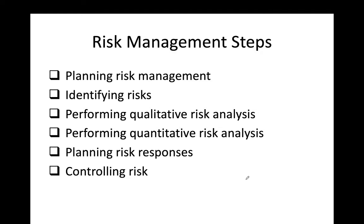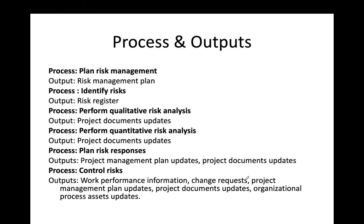There are six risk management steps, found on page 431 of Chapter 11. These steps are: planning risk management, identifying risk, performing qualitative risk analysis, performing quantitative risk analysis, planning risk responses, and controlling risk. Let's go through them one by one.